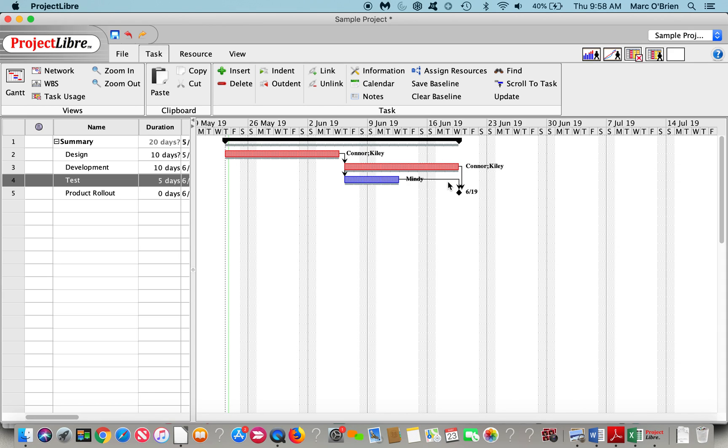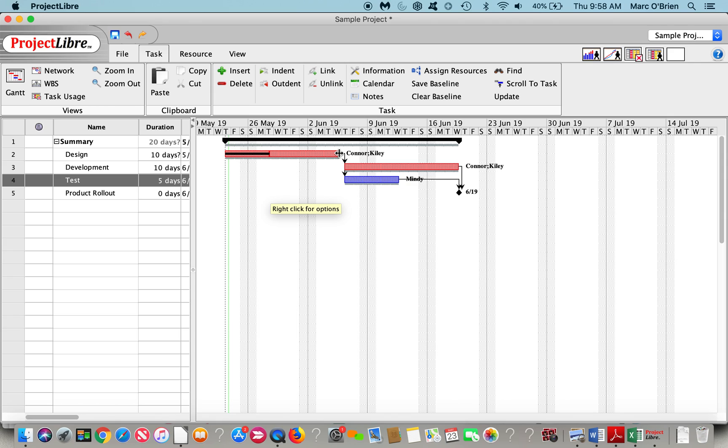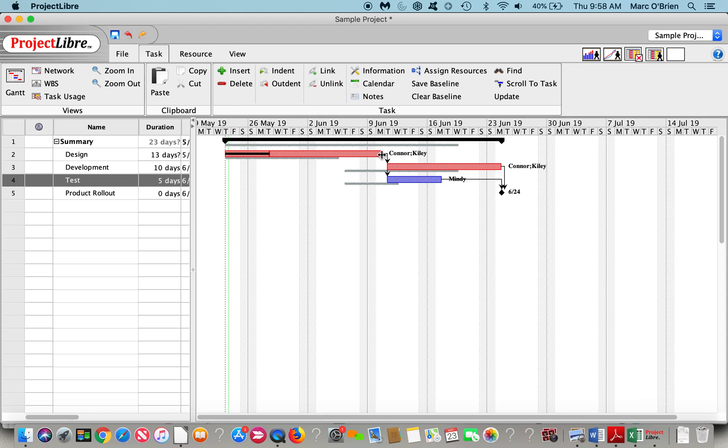I can progress these with putting the cursor in front. You can do it in the dialog box as well. I can come through and update the percent complete. I can also change the duration. You can split tasks too. But if this design task is going to take longer than expected, you can see the deviation that causes on the project and with the baseline.